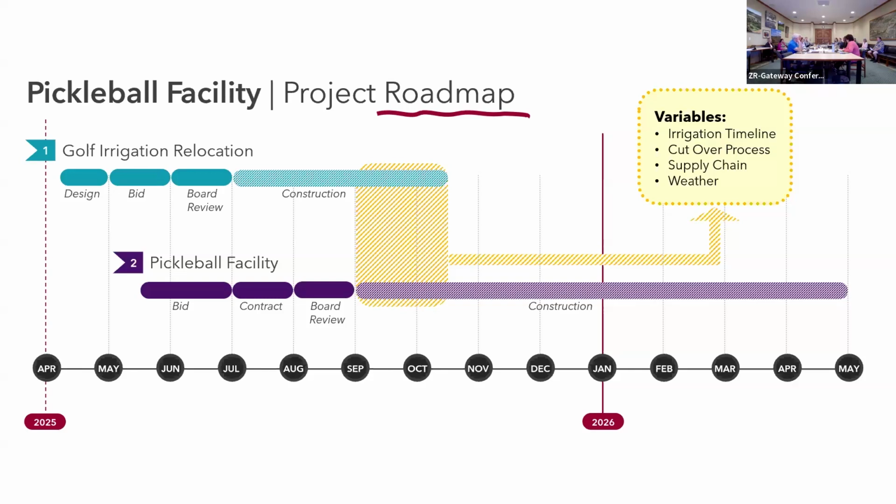Because putting a bid document together involves a lot of legalese that we need to make sure we have dialed in. Between the architect and our construction manager, there are certain things that you put together, but a matter of two weeks isn't going to make a difference. We're looking at the latest it going out to bid mid-May, so that's not going to make that big of a difference in the cost. But we also don't want to go out to bid prior to knowing more about the timing of that